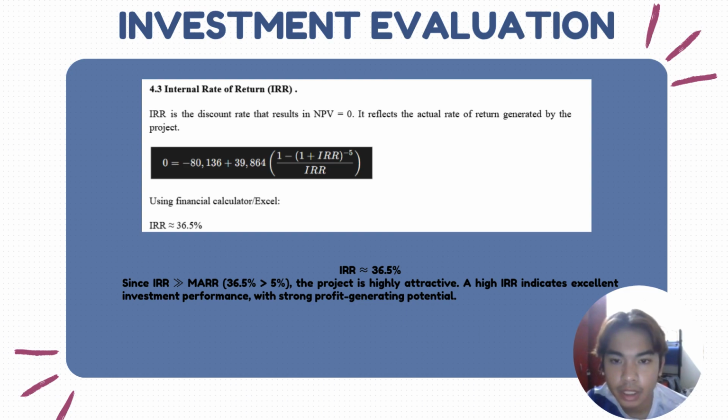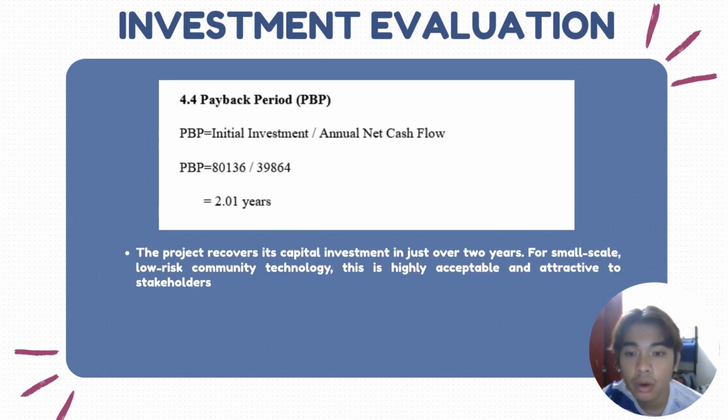For our internal rate of return, we gain 36.5%, which is higher than MARR. That shows the project is highly attractive and also excellent for our investment performance. For payback period, we undertake short period of time, which is 2.01 years. It shows that our investment is low risk, community technology, and also highly acceptable and attractive to stakeholders.